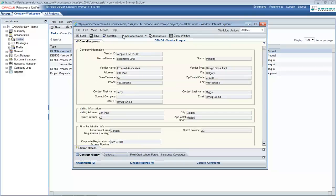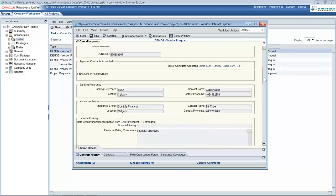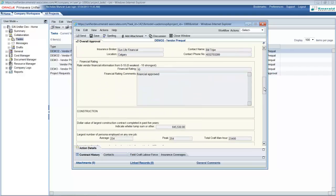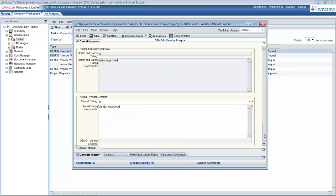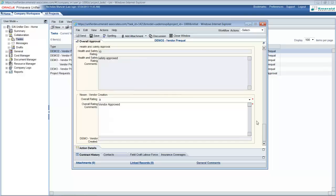In the final approval stage, all vendor information and line items are visible in the form. The individual division ratings are also visible, though note that here they cannot be edited. For overall approval, a rating will be given — here they have given a rating of 9 — and the vendor will be approved.